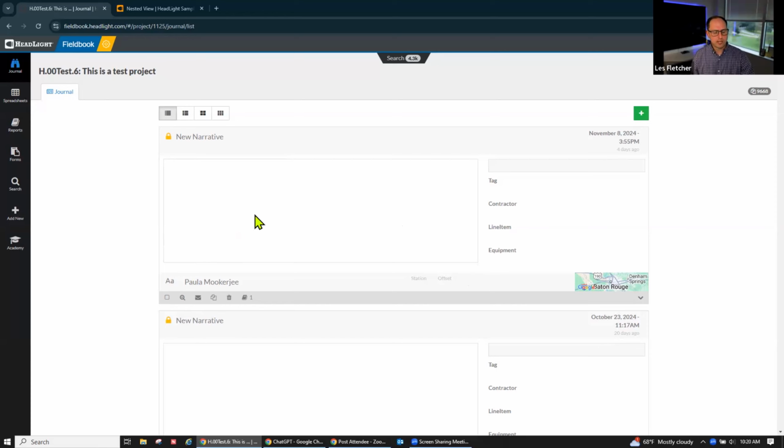I think what happens is you get a project, and there comes a claim on a project, where the PE and the contractor are not able to come to an agreement on the way something should be paid or built, and it ends up probably going to be a claim. So one of the first things you get from our section is, hey, I need you to give me a timeline of what happened, how it happened. If you're a PE on here, you've probably had to do this in the past, put together a summary of what went on, at least from your point of view